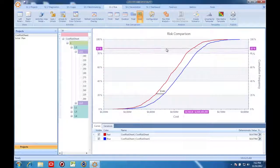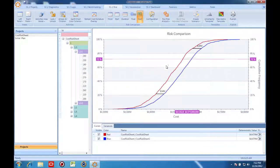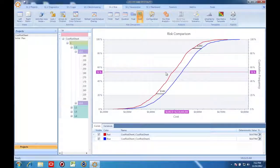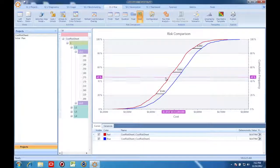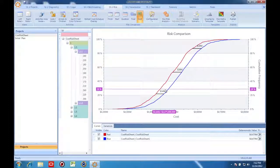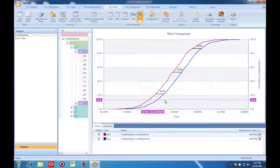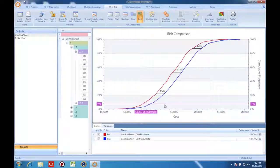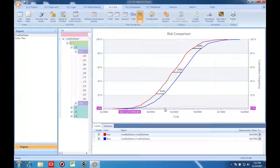On this screen, I can look at any of my confidence values and I can see what the cost would be at any of those values before I integrated the schedule risk and after I integrated the schedule risk to the cost model.